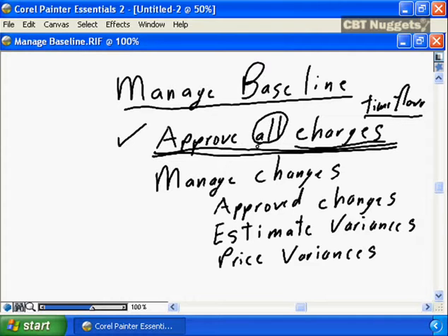If you're expecting a charge to your project and it's not there, don't say, wow, I got away with that one. Go looking for it. You're not going to get away with it. Believe me, again, I've been there. Sometime, somewhere, 3, 4, 5 months later, it's going to get properly coded and billed to your project, and then you're going to be in trouble because the cash flow management plan is inappropriate.